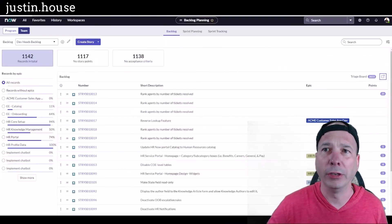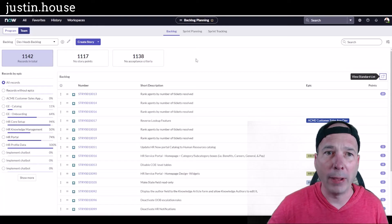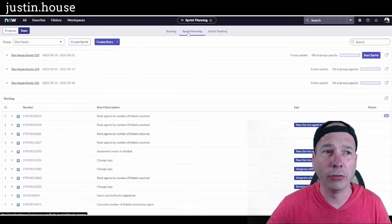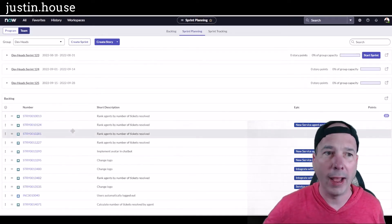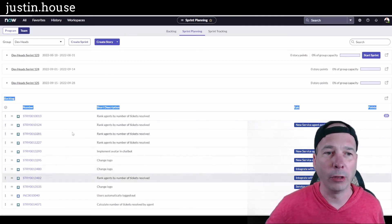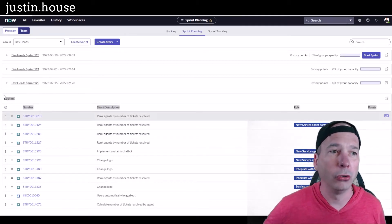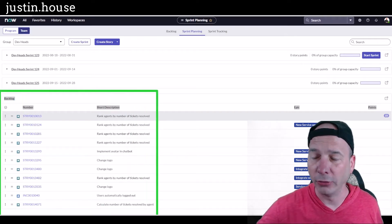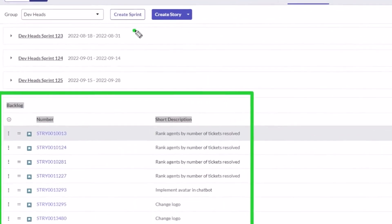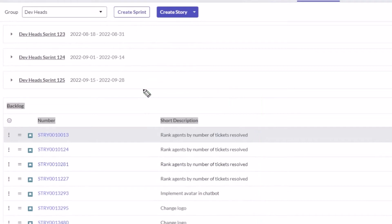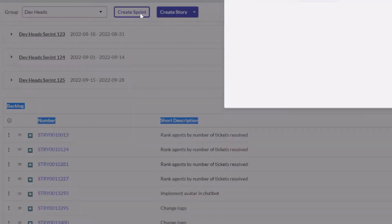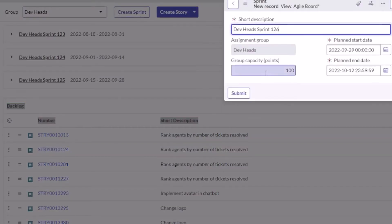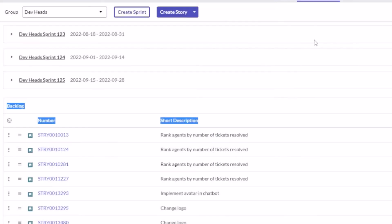I'm back to my backlog. I don't need to do anything else here. I can jump right over to sprint planning and now I have on my screen all the items in the backlog that I may want to start putting into my sprints for the dev heads group. I've got three sprints pre-configured up here at the top. I did it automatically using the tool where you can create multiple sprints, but you can actually come in here and do it from the sprint planning board. I can just say what the capacity is, this is pulling in from the group capacity.